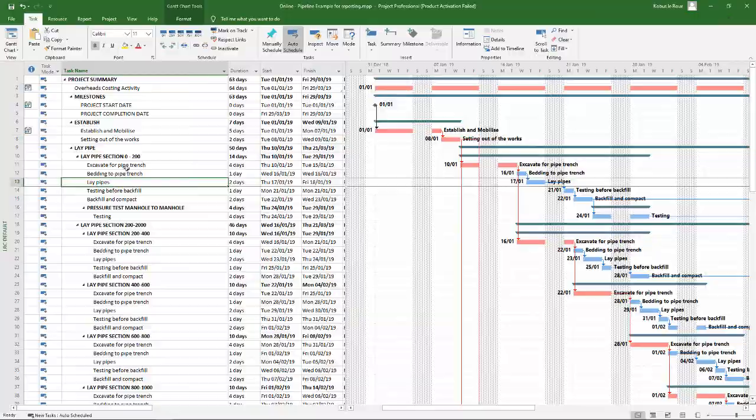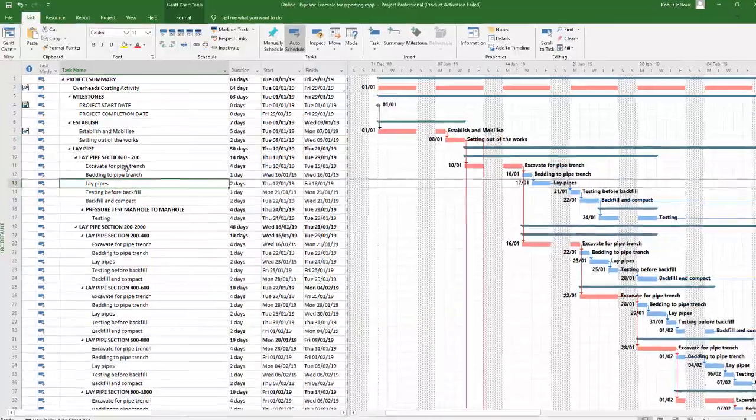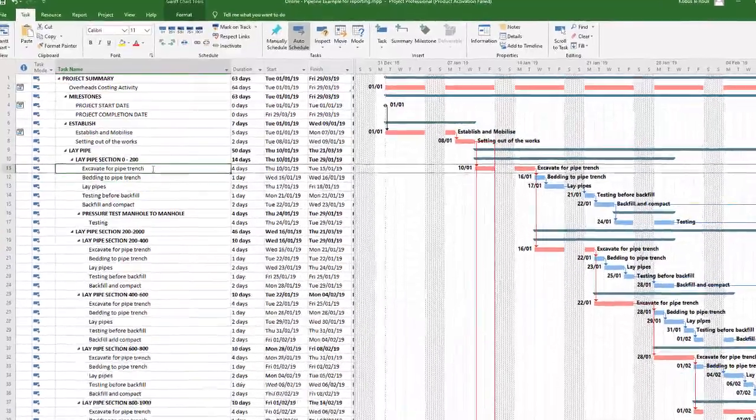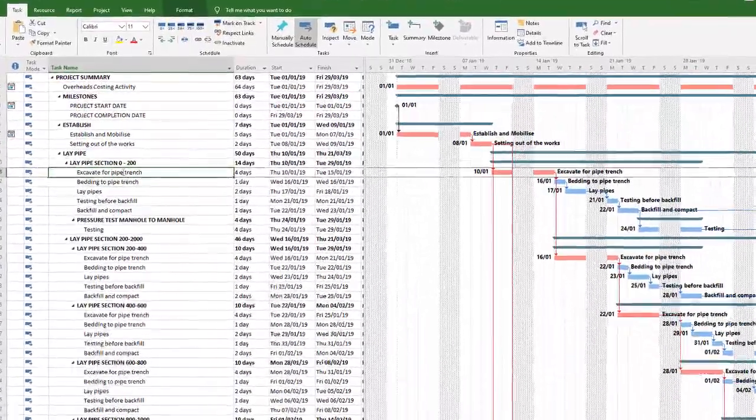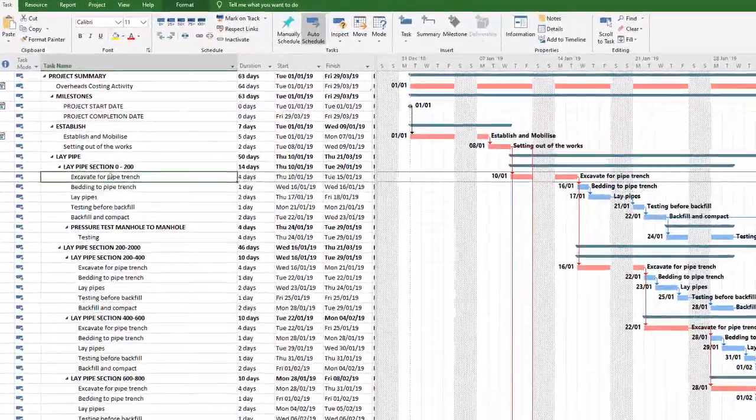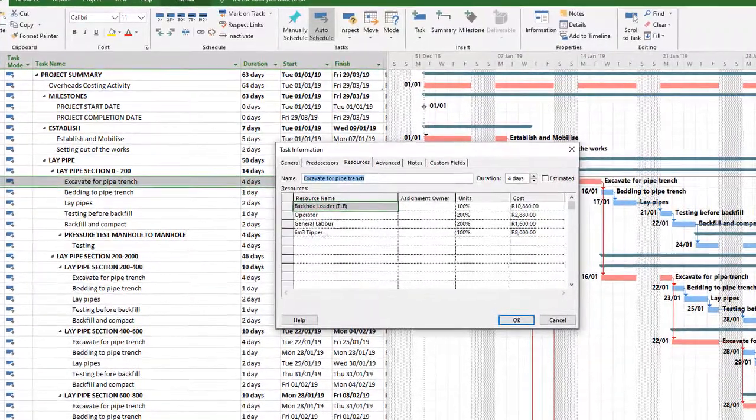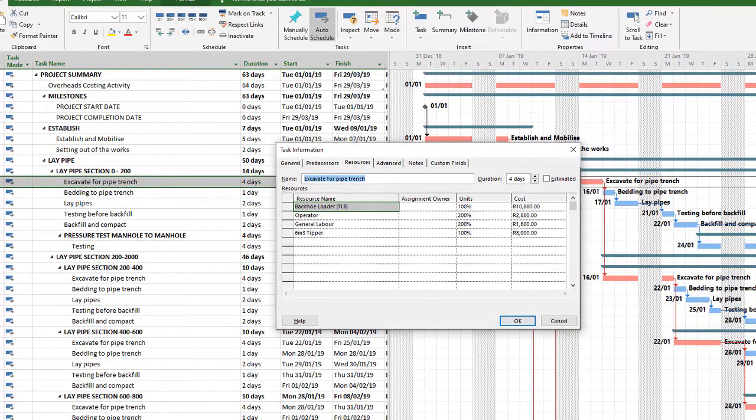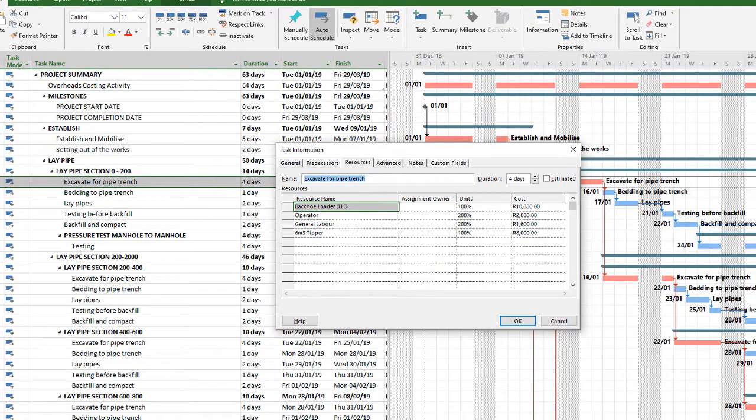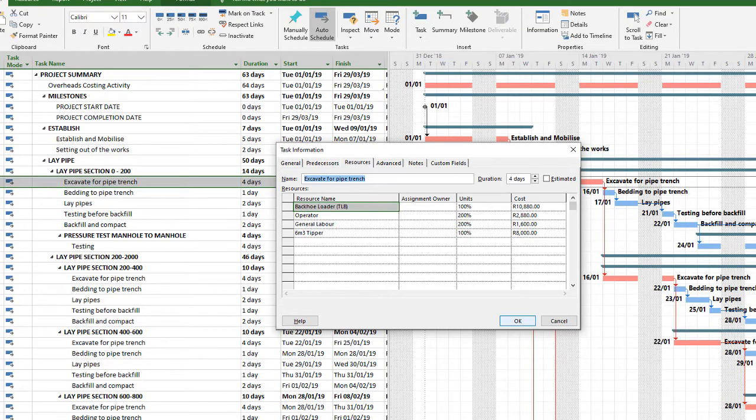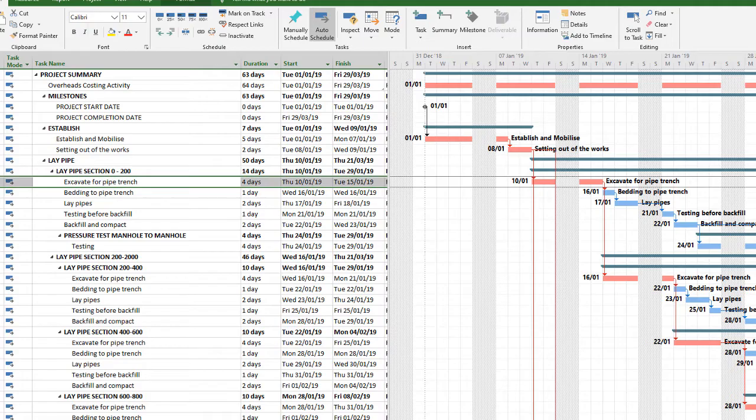If we focus on this section, the laying of the pipe zero to 200, that excavation. What I've done is to simply allocate my resources on it. So I've got one TLB there, two operators, two general laborers, as well as a tipper. The cost is already compiled because the production rate is the four days duration. It takes my TLB and simply applies the production to it.